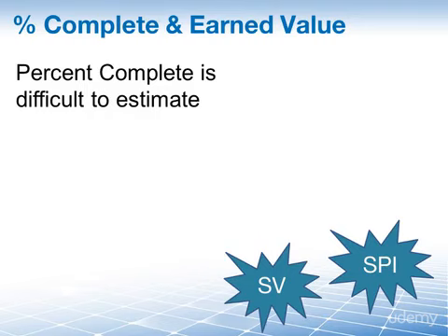So go ahead, ask anybody about their percent complete on an assigned task, and they may tell you, oh, I'm about 75% complete on this assignment. Ask them again the following week, and they may come back and say, well, still 75%, even though they have been working for a whole week on this task. Since then, it's very difficult to produce an accurate percentage.